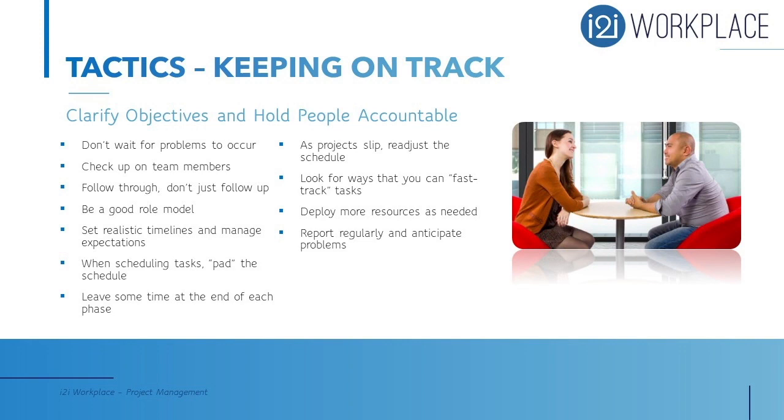Set realistic timelines and manage expectations. And when scheduling tasks, pad the schedule. Give yourself a couple extra days to ensure that all of the tasks were completed at a high quality standard. Leave some time at the end of each phase to debrief and wrap up any final items.